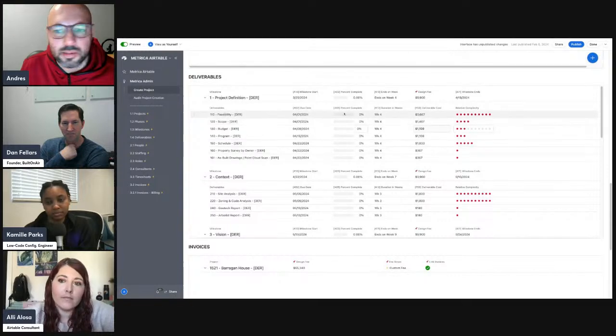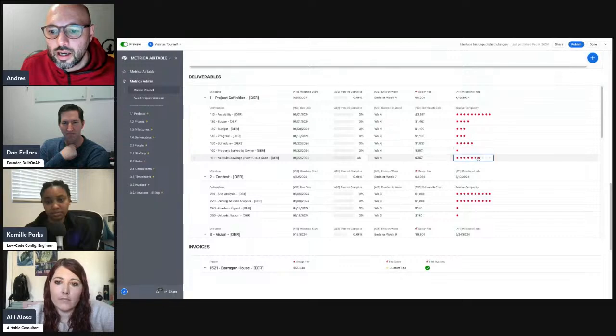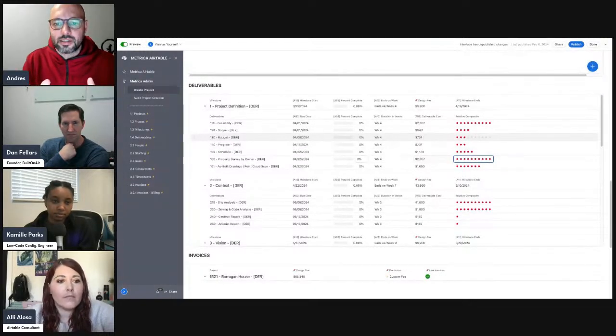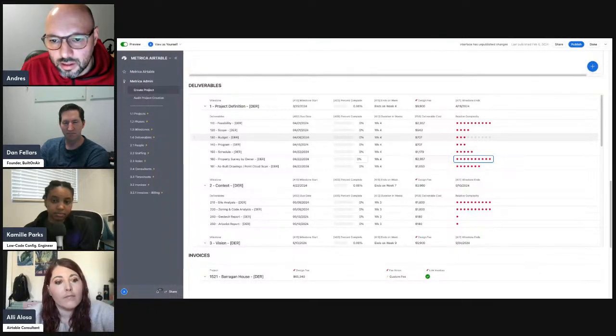It's not going to be the same as doing a whole feasibility. So I could change the complexity of each item, and they would vary the fee for each deliverable, but the design fee of that phase remains the same. So there's some structure that is fixed and allows me to adjust depending on each project, and the same goes with the staffing and the utilization.